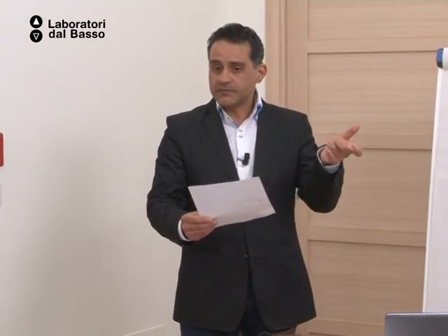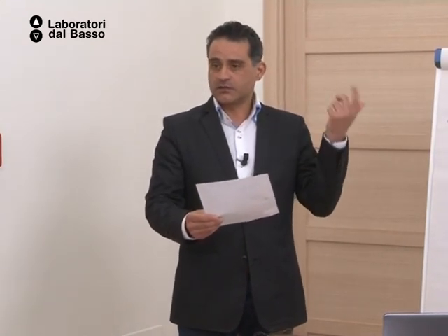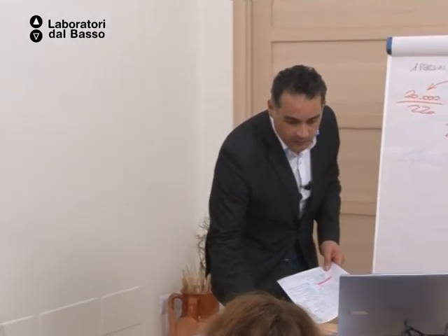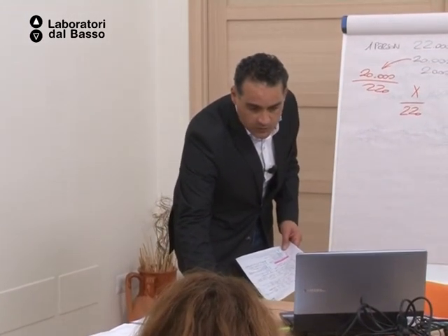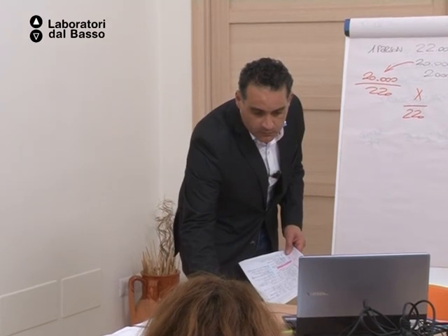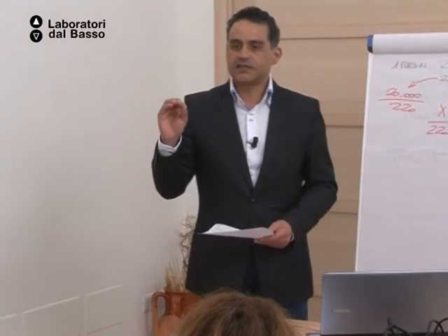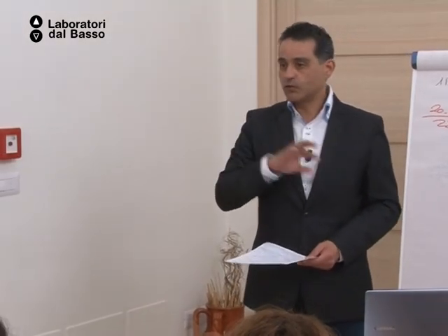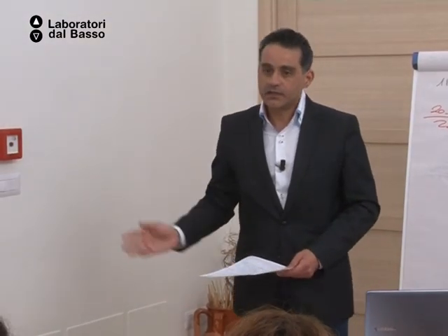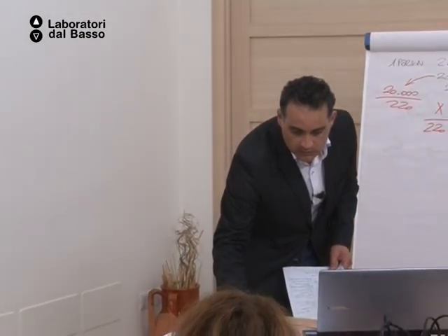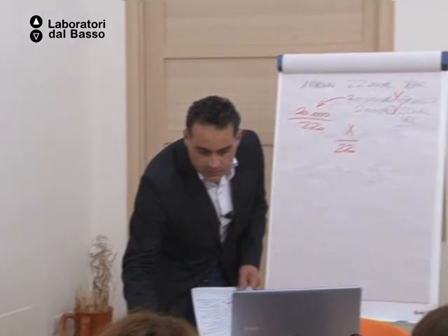The day rate tabs to have a look at are in guide part one, on table 5, I think it's even page 44. So what I mean is, once you've put all the staff days first for all partners, then you go back and put the costs per day.